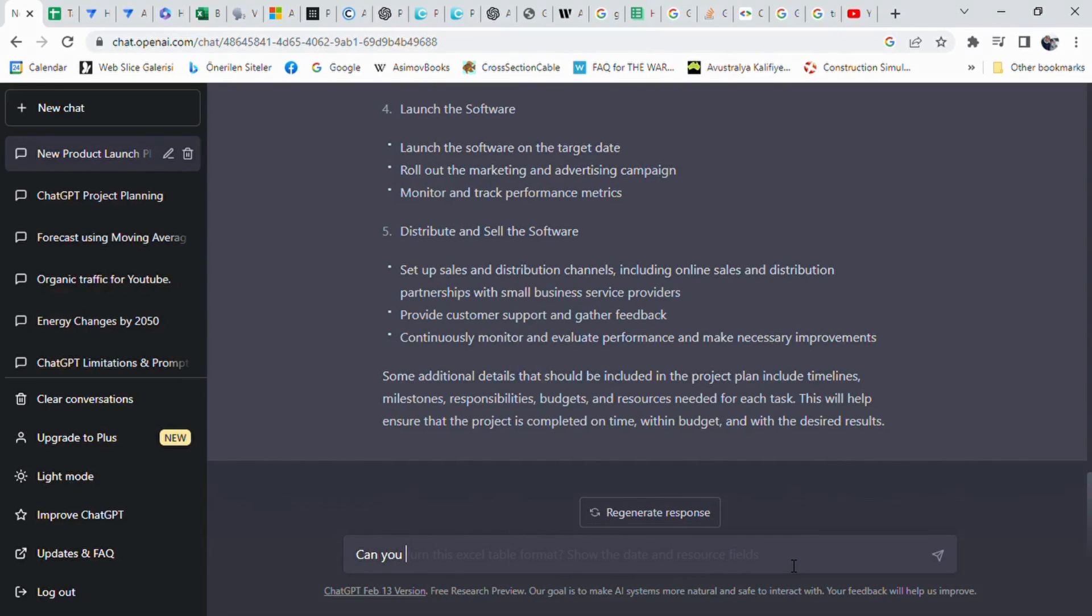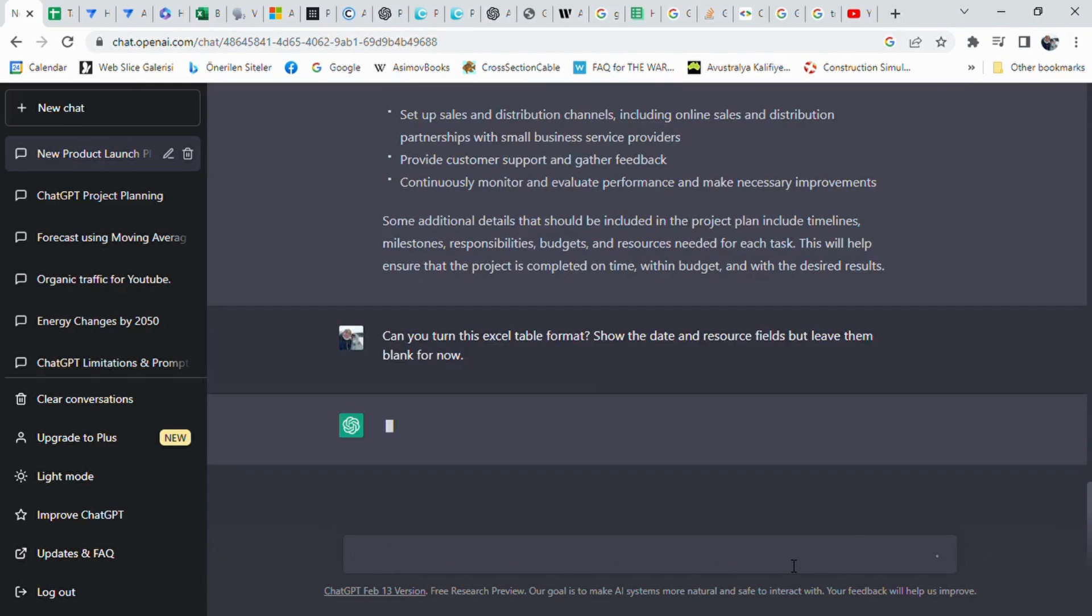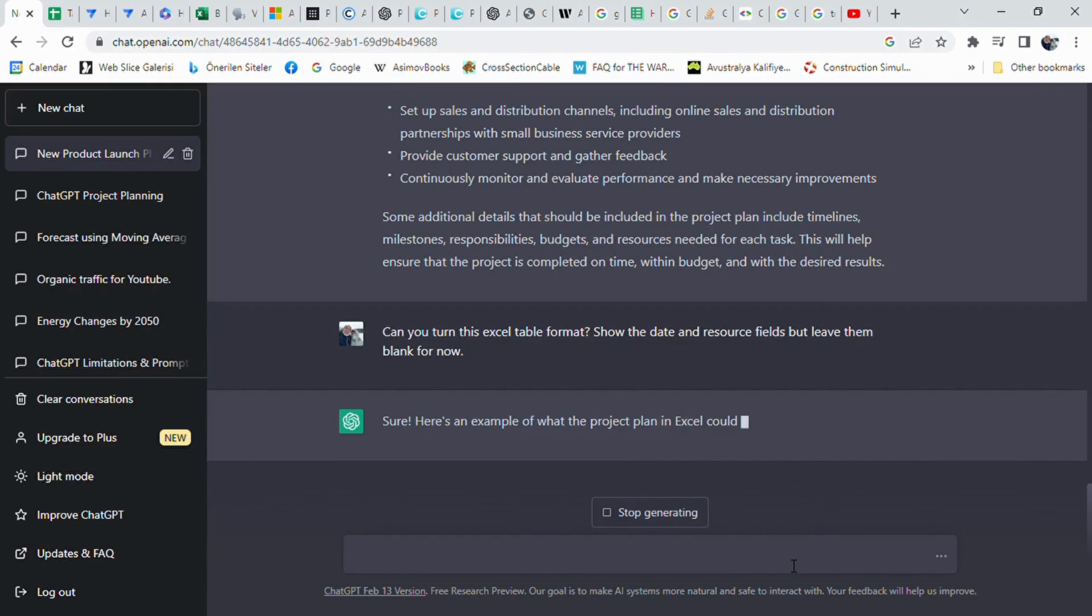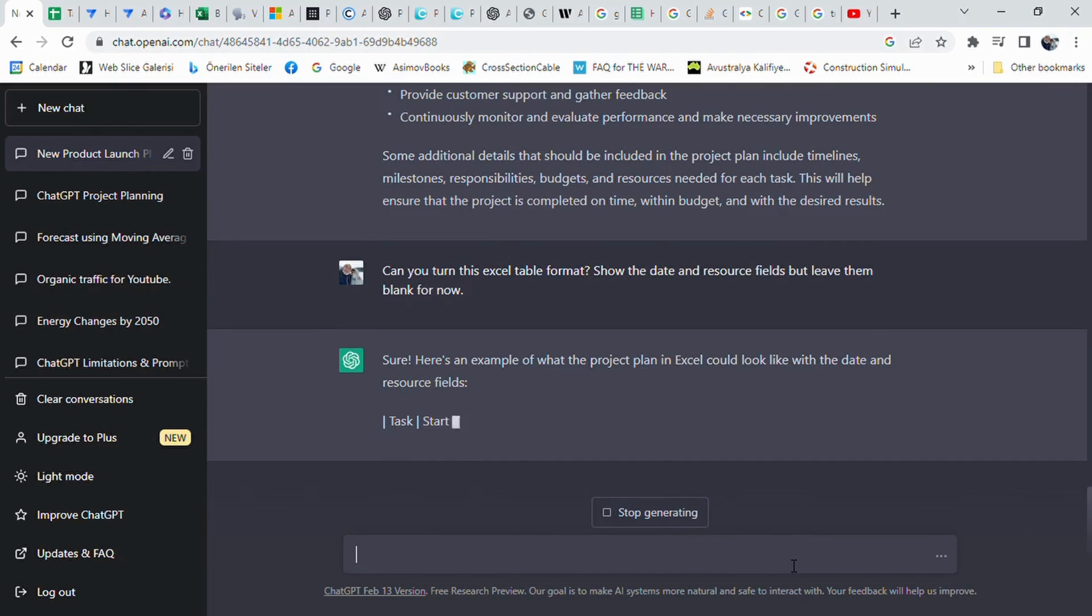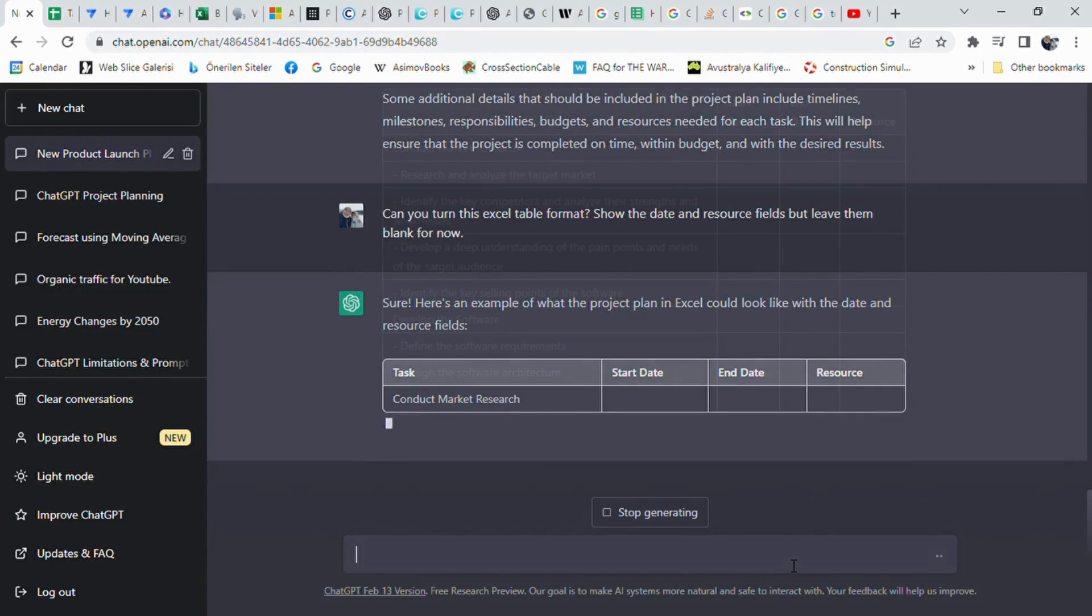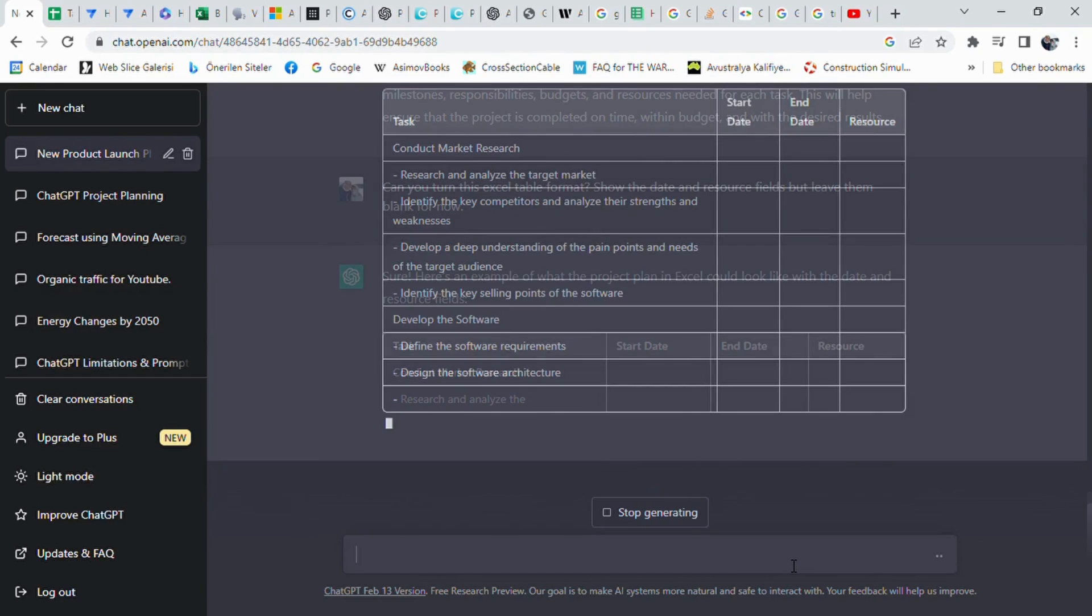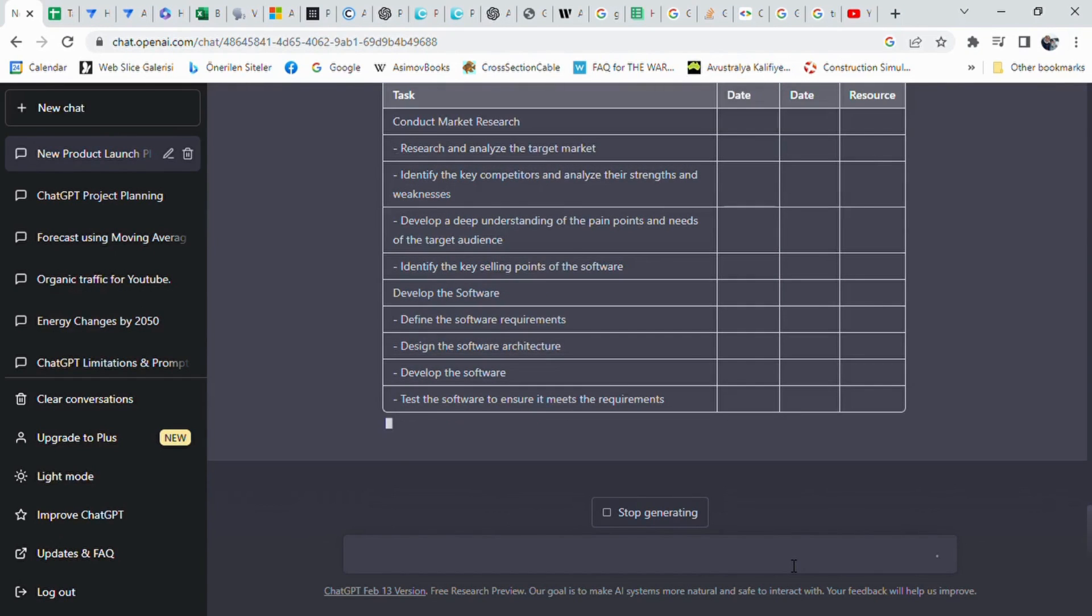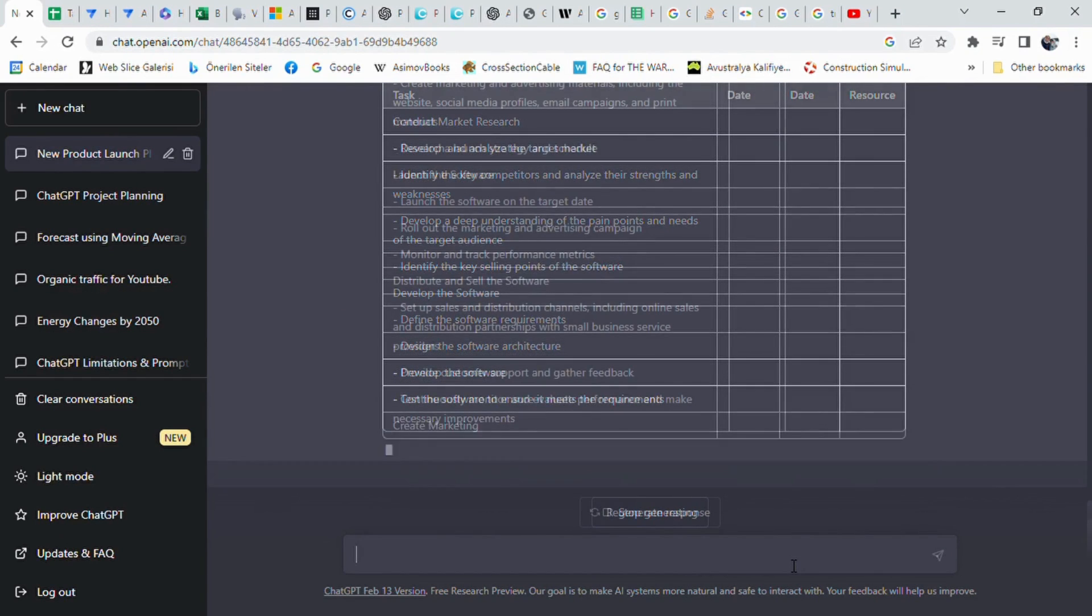Then I asked ChatGPT to prepare an Excel table based on the information by prompting: Can you turn this into Excel table format? Show the date and resource fields but leave them blank for now. As a result, I got a draft level 2 project schedule. I want you to be aware that ChatGPT is preparing tables successfully. Once the table is created, it's really easy to copy and paste these tables into Excel easily.